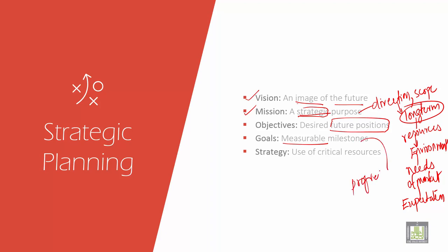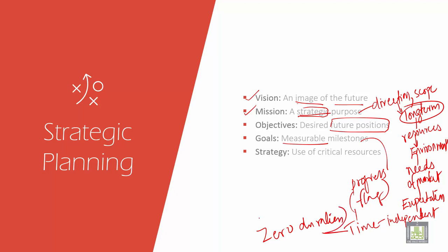They are the progress markers. They act as a flag. Flag means, for example, they have a time which is independent, very important. They have zero durations. This is very important: zero durations.